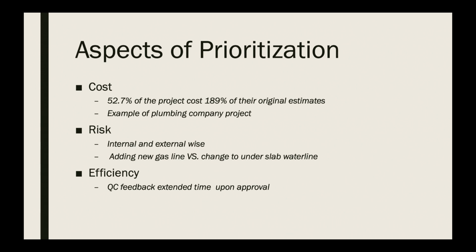About 6 months ago, a couple of changes were considered to increase the profit of the company. The first one of them is to install all pipes underneath the concrete at the roughing stage, then bring them up to the plumbing features at the waterline stage. One of the potential risks of this change is that it could lead us to lose customers, because a lot of builders are used to the old way and have been making profit from it. It might be hard for buyers to accept the changes and could lead them to lose their market.